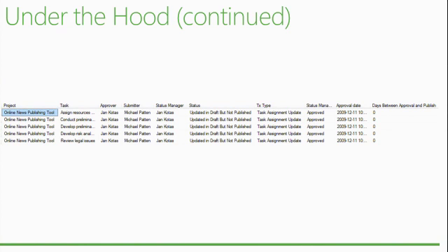All right, well, but you didn't submit it. So it was never sent to the approver, and it never started the workflow to be able to push the data through the various roles. Another thing is I submitted my updates, but the project manager or the status manager never approved them. So they are still stuck there in some table in a transition state, waiting for the approver to follow the process and do what they are supposed to do.